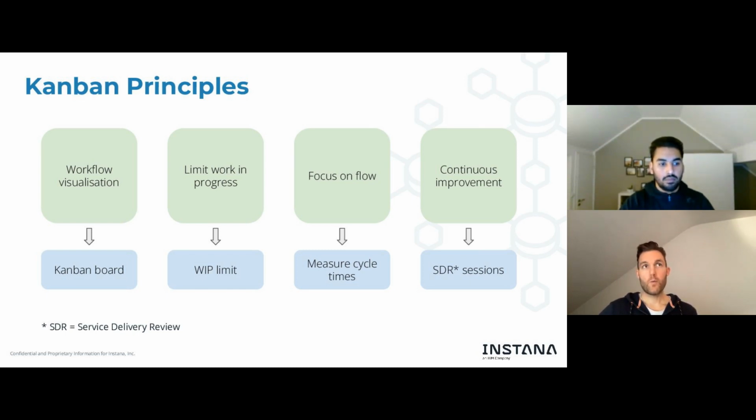And one feature you could apply when using Kanban is to limit this work in progress, in contrast to this push model where you have everything up in the air which comes from the outside. You just focus on the stuff which you pull into progress right now. And by limiting the amount of work items, the idea is to reduce context switches, reduce waste, and improve cycle times.